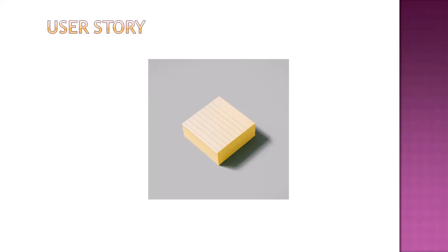When we are performing something on this, it is nothing but a task. It's not like I will only develop this. If I don't test this, who is going to use it? I will only design this. No one is going to develop it, and no one is going to test it. Then what is the benefit of that design? So what is the value that we are delivering? That is very important. So user stories should give a logical value, and user stories should not be written based on the work stream. Work stream means, as I mentioned, testing, design, engineering, like that. It should be a blend of everything.